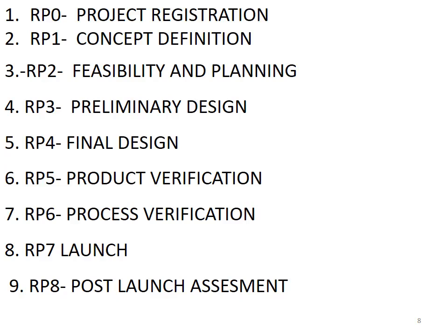So now here we have to measure the sales. To begin with the product development, we have to forecast the quantity of the product to be absorbed in the market. So here we are going to analyze the sales versus the forecast. Now complete phase in and phase out, register obsolete and scrap product, monitor return on investment. Now here we have to analyze how much return the enterprise received after launching this product.